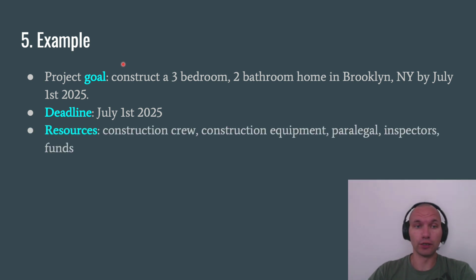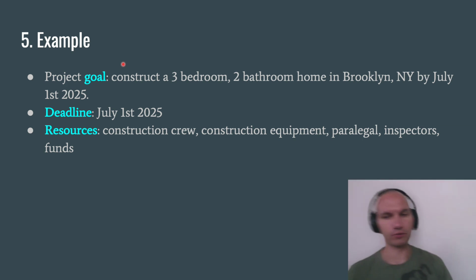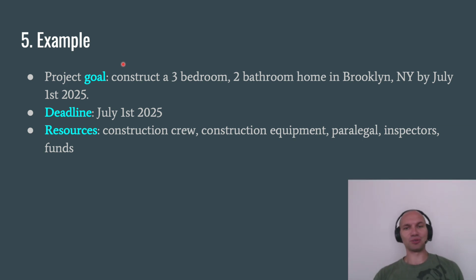Then you will look at what your resources are. You're going to have your construction crew. You will have construction equipment. You're going to have legal folks that go around collecting documents, permits, forms, stamps for you, all kinds of authorizations, because you will need those along the way. Building a house is actually a lot more cumbersome legally than some might think. And then, of course, your inspectors that will show up and inspect your work along the way and when it's done to make sure that everything is built to code. And then you're going to have your funds, the amount of money that was borrowed from a bank, transferred to you from a customer or from another company.